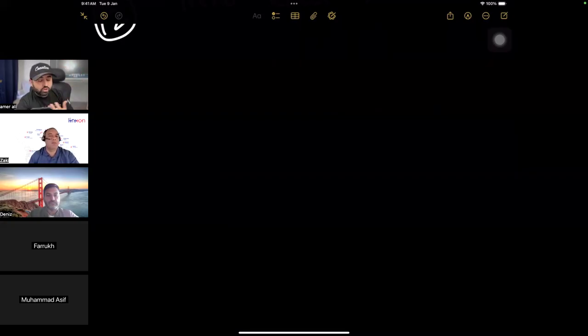We also have, when the scope is not clear, cost reimbursement contracts. Cost reimbursement includes cost plus fixed fee, cost plus incentive fee, and cost plus award fee. So what do you do? You reimburse the person for the things he has done, plus you pay his fixed fee. Okay. For example, I take my car to a mechanic and he changes my oil. That's the simplest thing. Everybody does it, right? Put it in the chat box. So he changed the oil, you pay him for the oil and his fixed fee. That is cost reimbursement fixed fee.